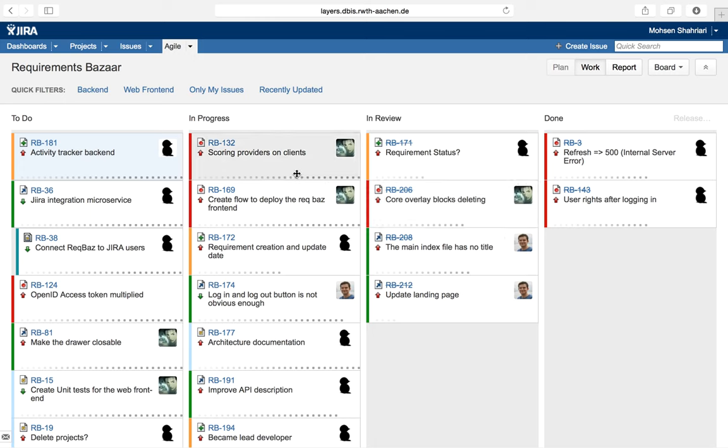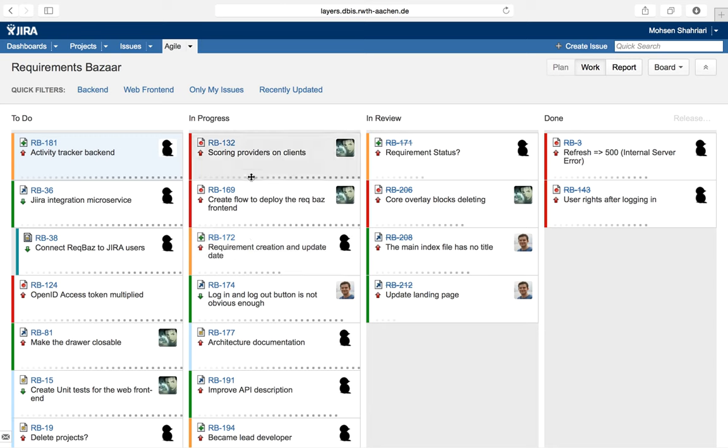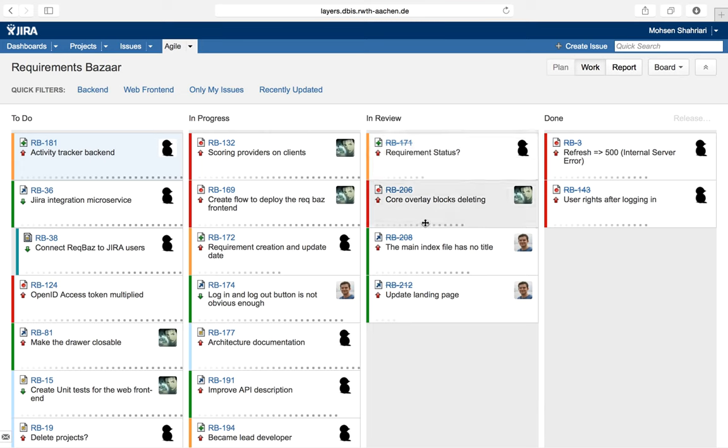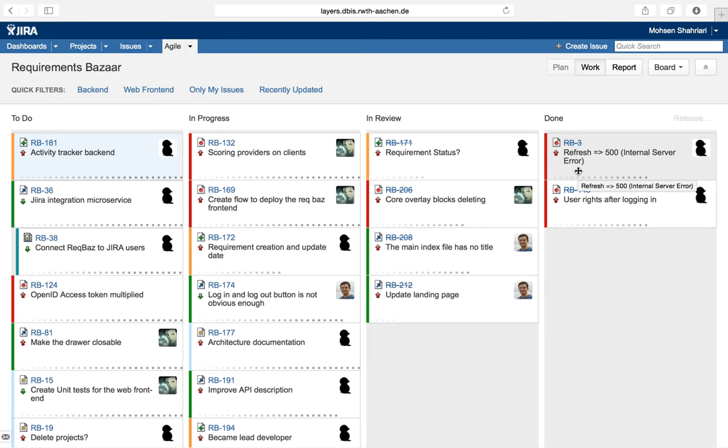ToDo state comprises tasks which have not been started. InProgress lists tasks which are actively under investigation and work by the developer team. InReview state reviews the code and does some testing phase after resolving the issue. Done indicates tasks which are fully accomplished and resolved. When a developer starts working on an open issue, then it will be assigned in progress state and one can see it in its workflow.